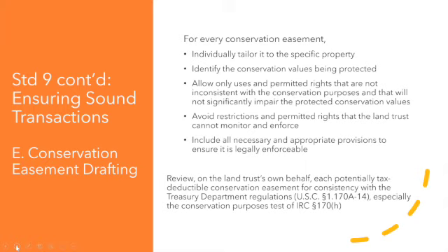It's about essentially the public benefit and conservation values of the transaction. But they end up doing a fairly extensive review, and in fact, it's grown to be a useful partnership. And the conservation restriction, there's a model conservation restriction document that they promulgate with updates frequently, with a lot of input from the land trust community, that serves as something of a starting point for Massachusetts documents.